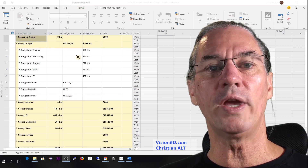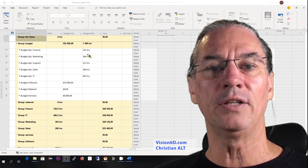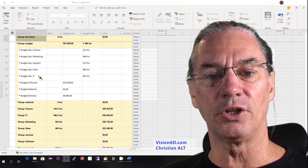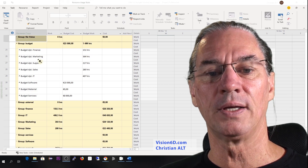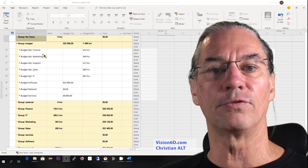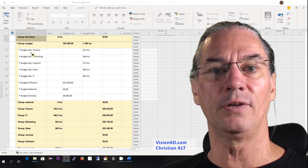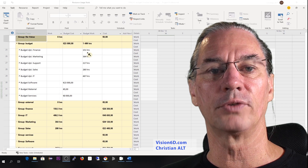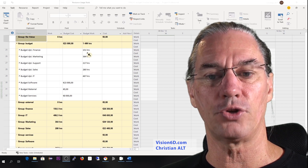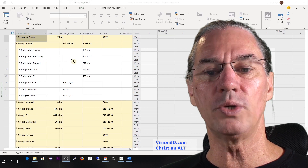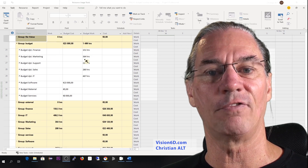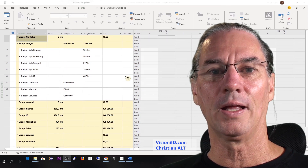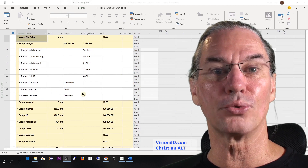Beside that, we have hours which are the involvement of internal co-workers, and we can have here a view over departments. For example, if we take the first line, the budget of the finance department, we see that people there will be involved for 151 hours. For the marketing department, people will be involved for 364 hours, and so on for the other departments.